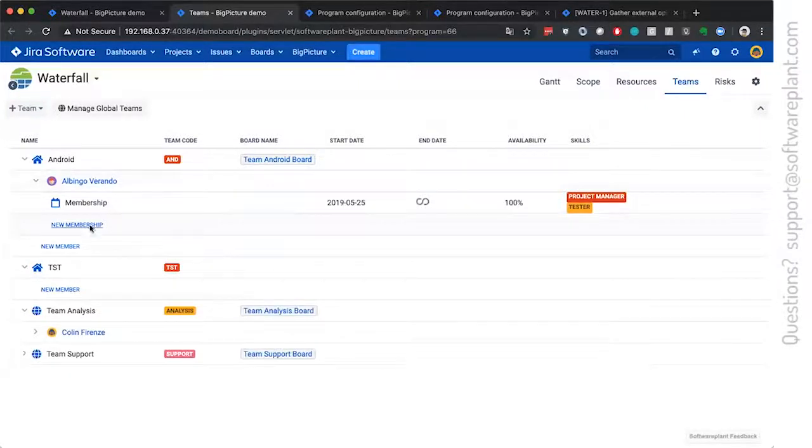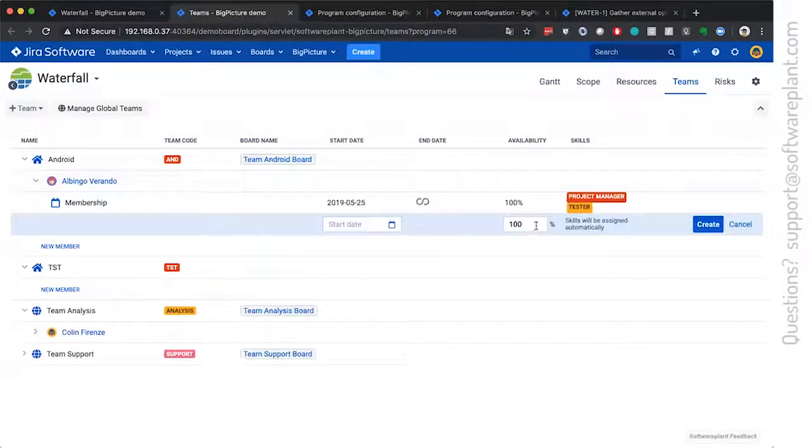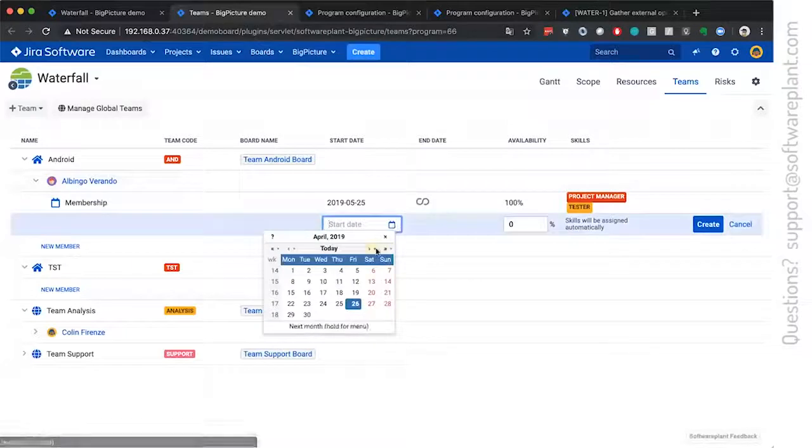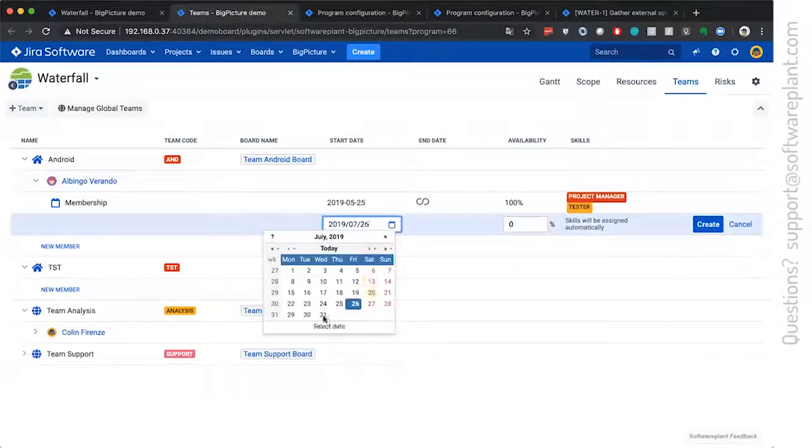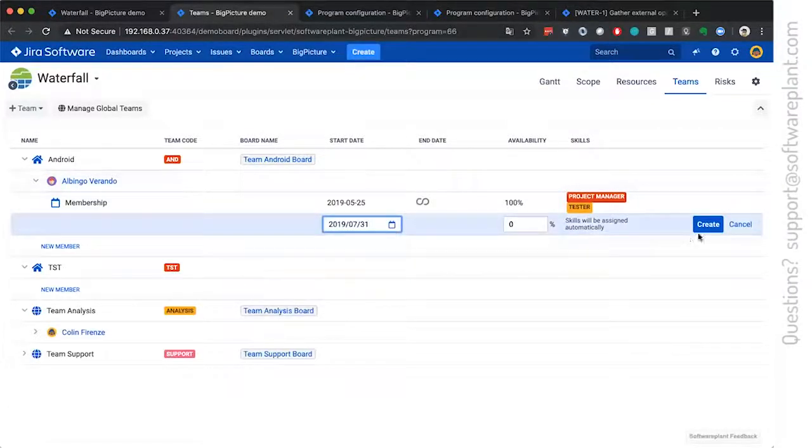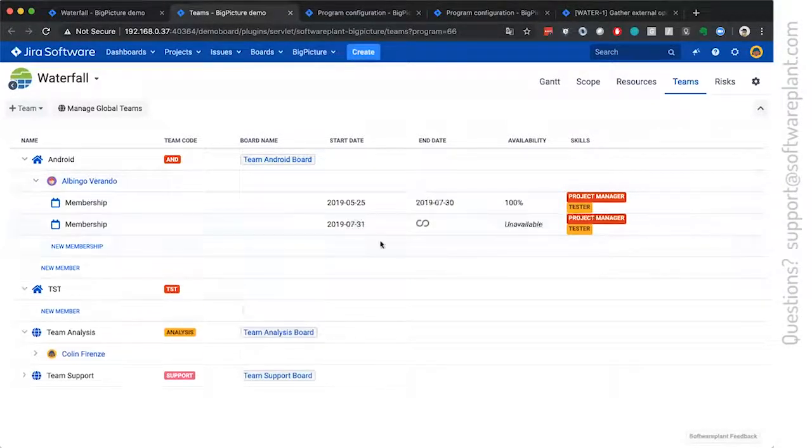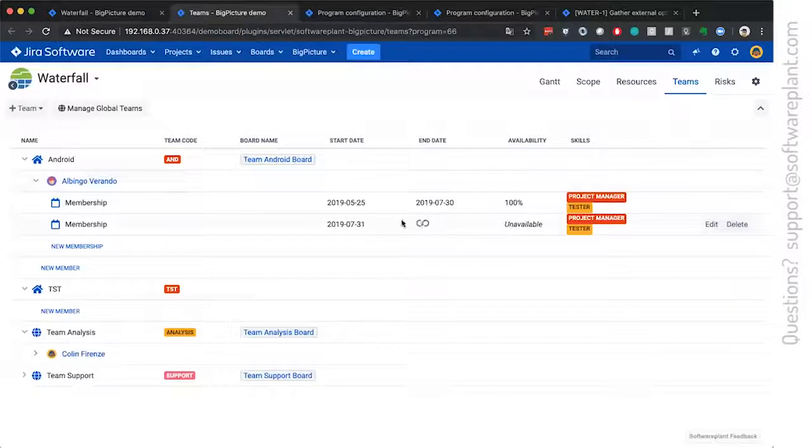For situations where somebody will leave the team at a known date, please just put in availability zero and she becomes unavailable.